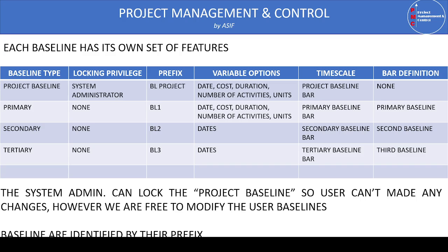If you assign a project as a secondary or tertiary baseline and go to the column bar, you will find only the baseline secondary or tertiary dates. But for the primary and project baseline, you can find columns for date, cost, duration, number of activities, and units. This is the major difference between the project and primary baseline compared to the secondary and tertiary baseline.